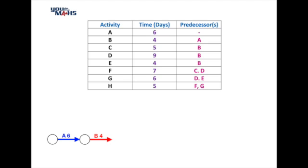We can then see that we've got three activities which have B as a predecessor. So three activities will come off the node at the completion of B and that's C, D and E.